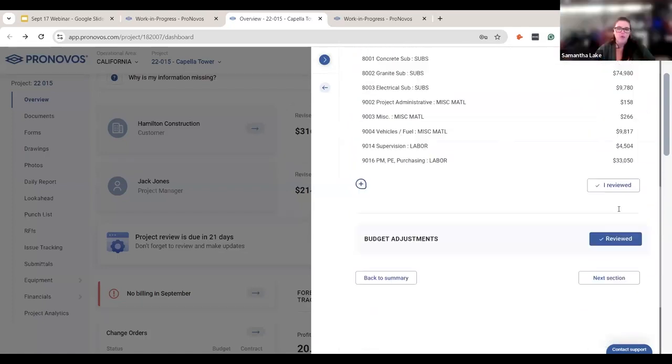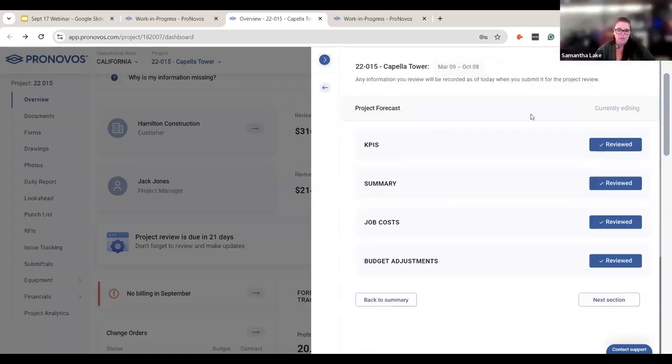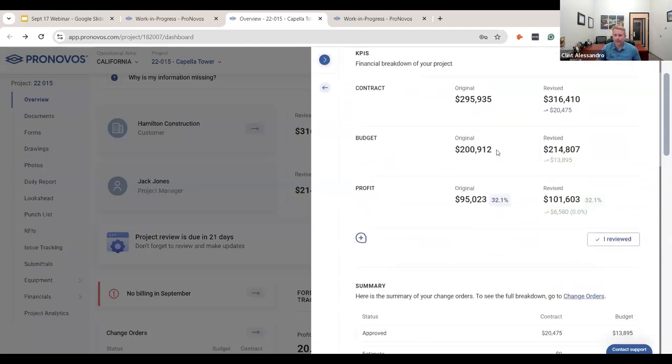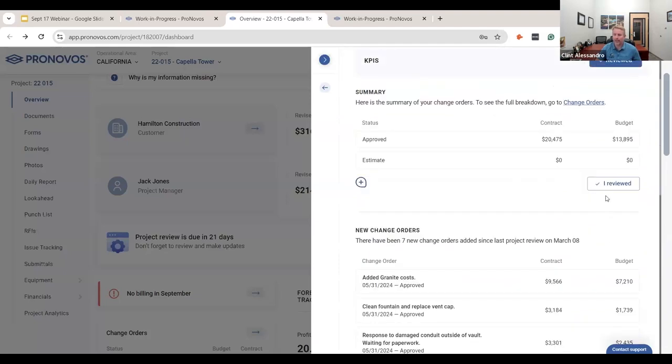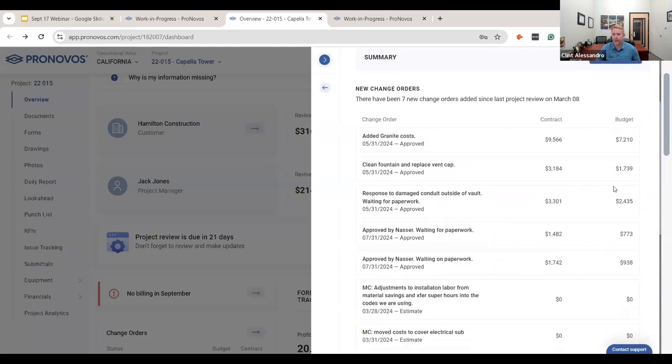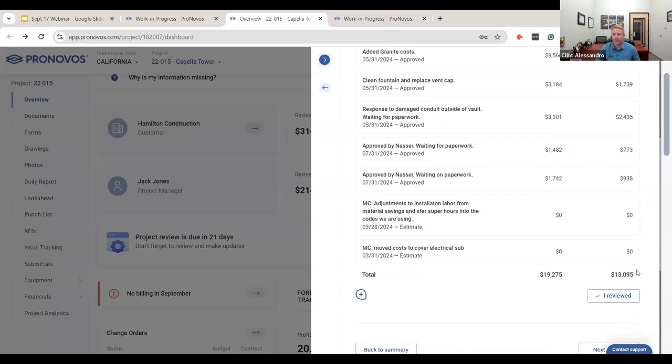So is this required that all of your PMs go through this process before meeting with the CFO? Yes. So what we do is I've integrated this into our monthly process where they not only have to do their projections of costs, but they also have to do their billings at the same time, and they do the review process at the same time.